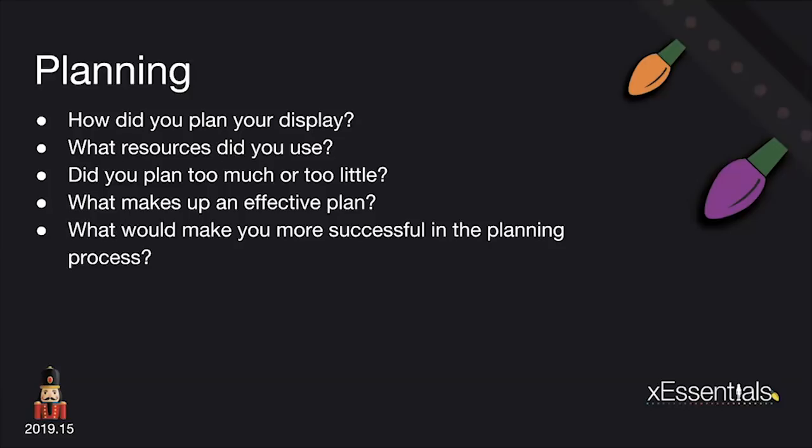And I found myself late December still building stuff, and it was a mess because I'm building props and I've needed to sequence, and I have mapped some and I've sequenced some, but now I've added more things. I'm going in there and having to remap and re-render and do a whole bunch of stuff really late in the season when I should have already had it on the house. And so not having those target milestones really kind of bit me.